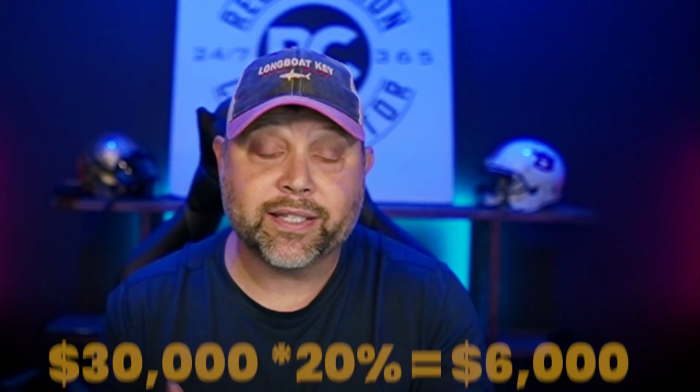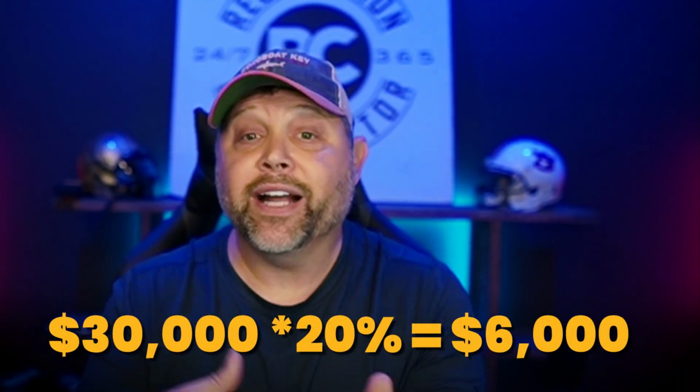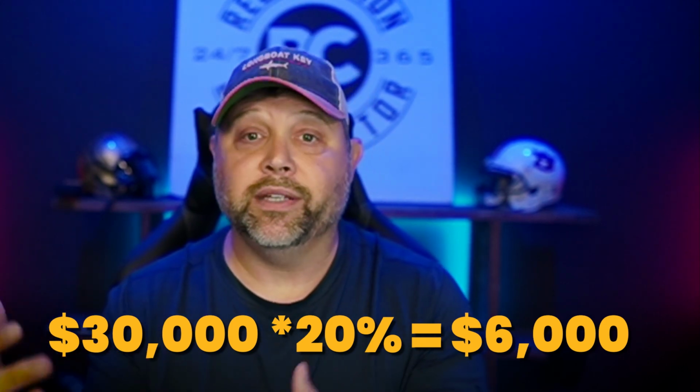And I would invite you to be very upfront and forthright with your clients the same way when you work with them, okay? But that's the reason why we started putting that in there, is because a couple of times there were situations where the client just suddenly, like, oh, wow, 30 grand hits a little different when it's in your hand. And then they don't want to pay you for the stuff that you've already done. So we would say, okay, that's great. So if we did 30 grand, I want 6 of that. And that was the genesis for us putting it in the contract, was in the roofing world. And then we carried it on into reconstruction.